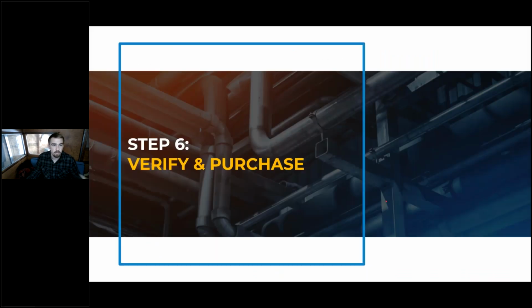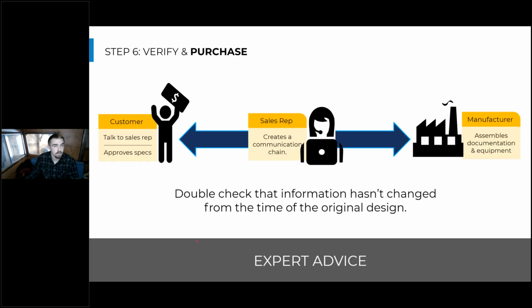And so after the submittals have been submitted and all the details have been worked out, now it's time to verify and purchase the heat pump water heating equipment. And oftentimes there's a pretty long lead time between the submittal creation and the actual purchasing of the equipment. The engineer has to sign everything off and then the project has to gestate. But you want to make sure, again, you're working with the rep and the manufacturer to verify all the information you can in case anything has changed.